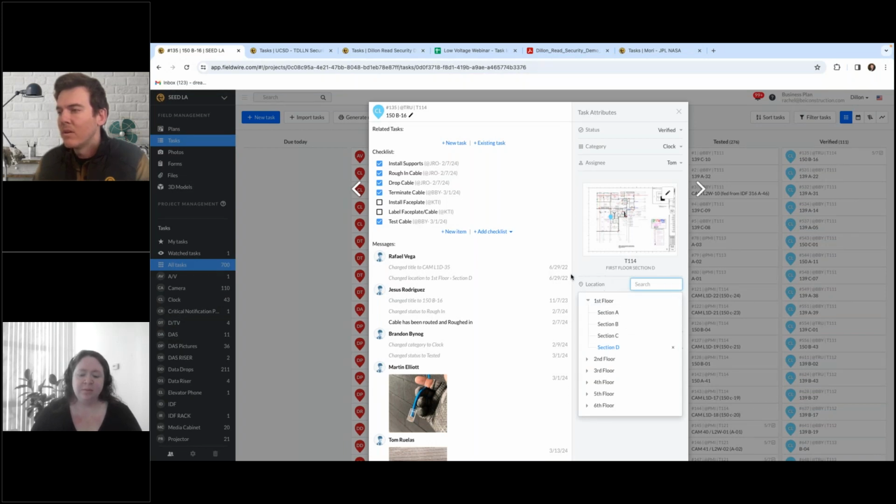Yeah, because we have other trades and contractors that are waiting for us to finish our scope before they can move into certain spaces. Being able to very quickly sort and filter through, okay, first floor, these classrooms, and show them exactly where our progress is, so that they can anticipate starting their trade, is really important. We can generate the reports off of that to give a really quick understanding of where everything is located.